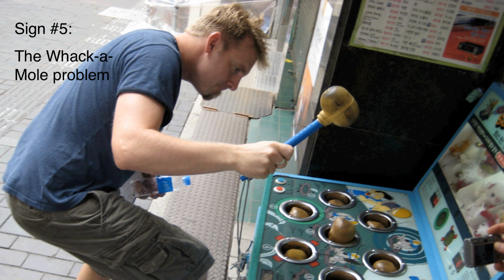And so we see this very often where you'll fix one problem, and this is particularly problematic when you're dealing with multiple vendors for the hardware and software. This can lead to fixing one problem, but then one or multiple other problems popping up that you've got to deal with. And if you're using multiple vendors, this has a bad tendency to lead to a lot of finger pointing and to people not wanting to, and maybe not seeing the complete picture of a system-level view of how all of these things are working together, and therefore aren't able to solve those problems effectively, or perhaps cause more problems, even though they might fix the one right in front of them.